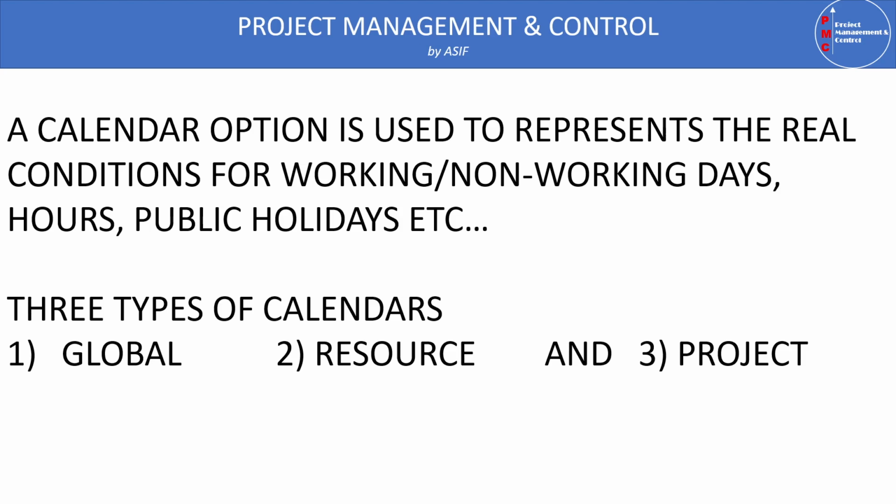Similarly, every country has its own holidays, like New Year's and National Day. Such holidays are always there, and we have to define them in the calendar. So calendars are used to define our working hours and non-working hours, and some exceptional duration for any day, and similarly to define holidays, gazetted holidays, and national holidays for the project.